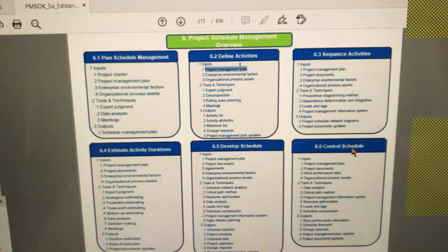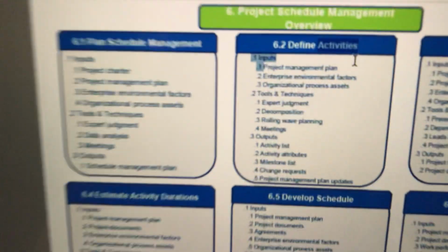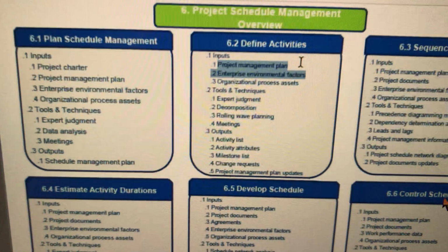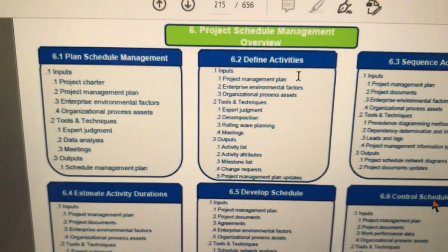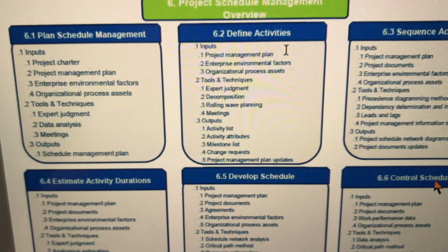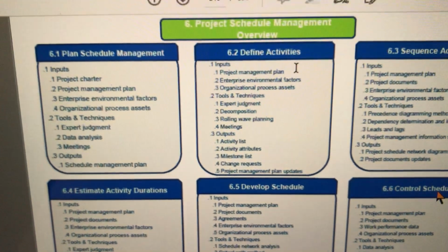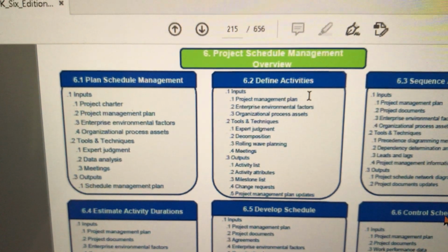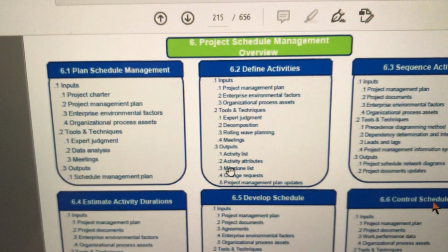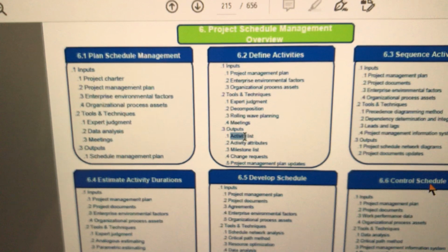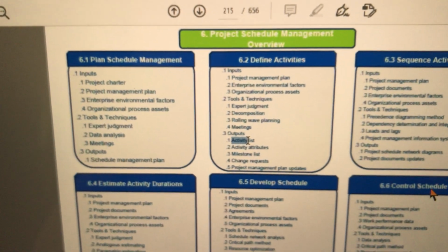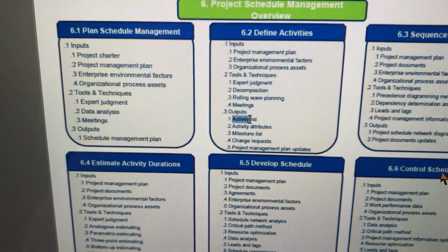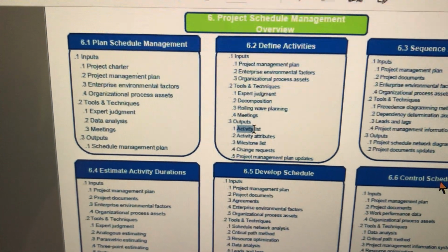Okay, this tells you as the project management plan. Very high level. In this project management plan, the key component will be the WBS. WBS stops at a work package level. Now, a work package can be further decomposed, broken down into a lower level or child level work item, which is called the activity. So, to generate a list of activities, you need to have the WBS. So, before you can proceed with schedule, you have to do the scope.